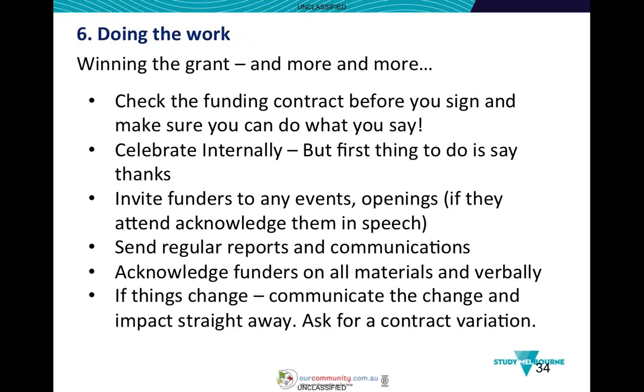Look, if things change, hey, that's life. We're aware that things are going to change, particularly if we are relying on third parties. The important thing here is that if things change, communicate that change and the impact of the change straight away to Study Melbourne. Talk to them and ask for a variation. Tell them what's happening and what you're planning on doing to address that issue.